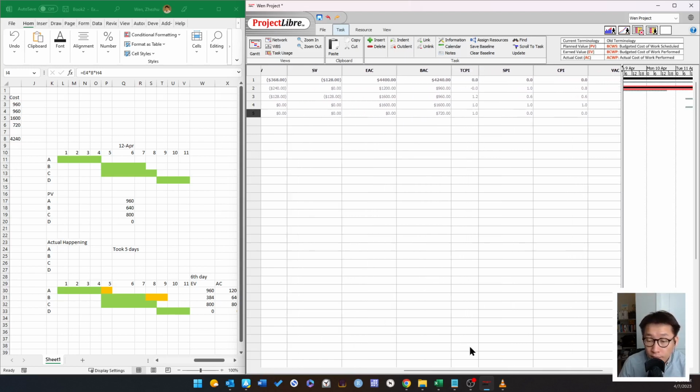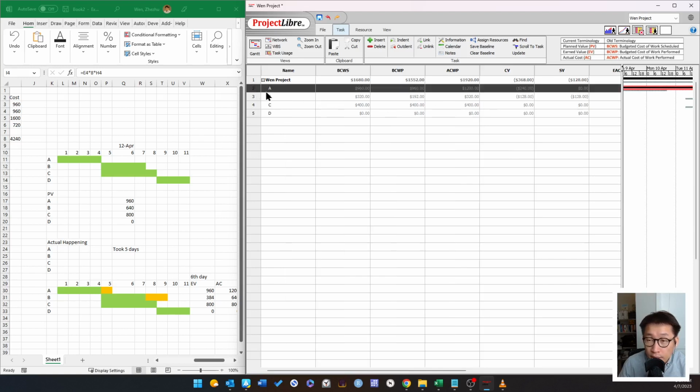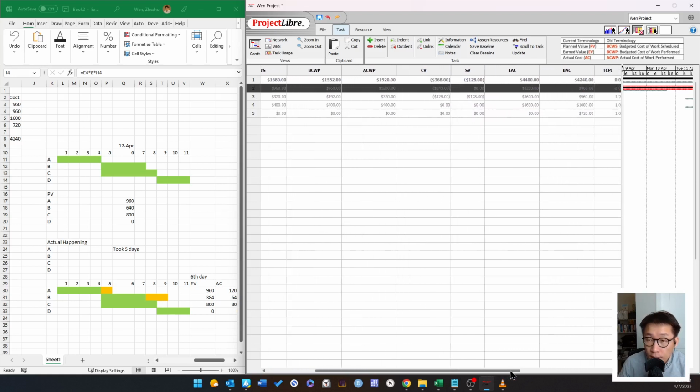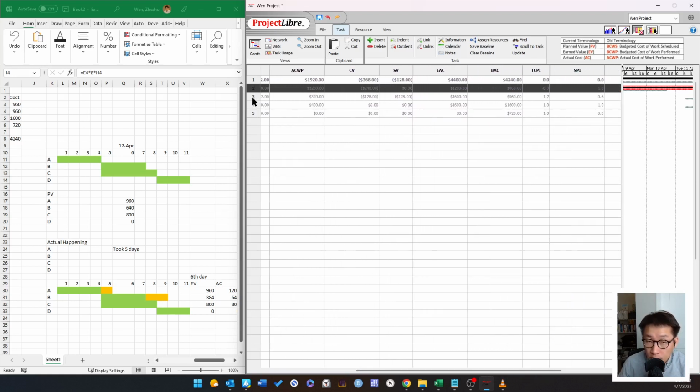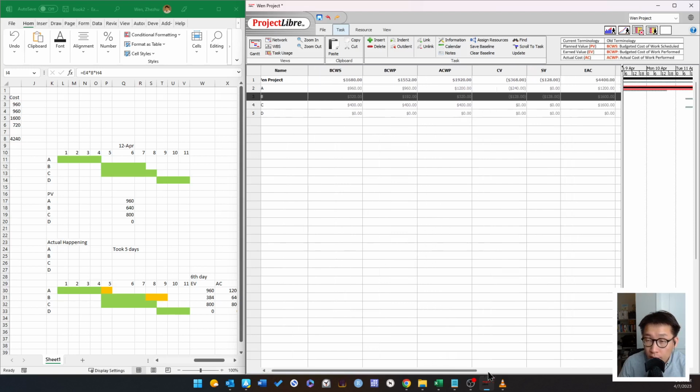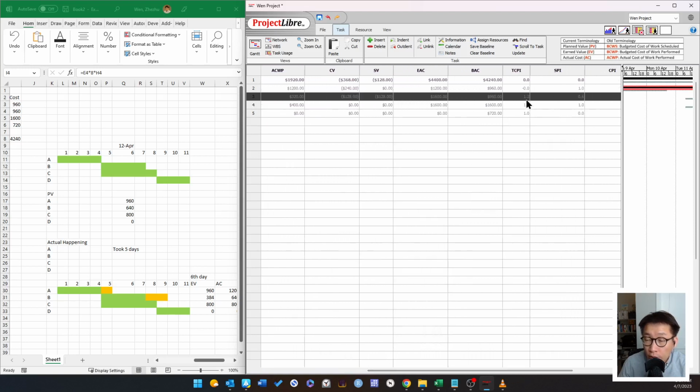So at this point, because A is already completed, we can discuss activity B. Okay, to complete this thing on budget, on schedule, for each dollar you are spending, you have to make $1.2 progress when it comes to the value.